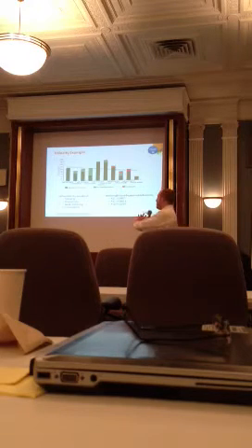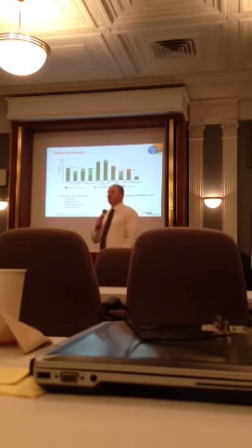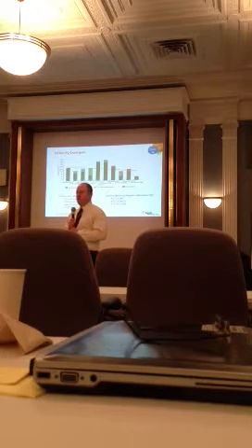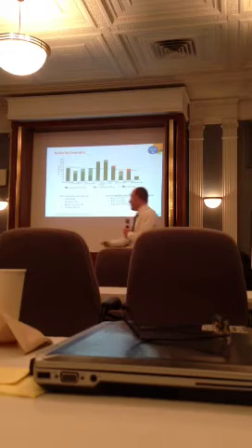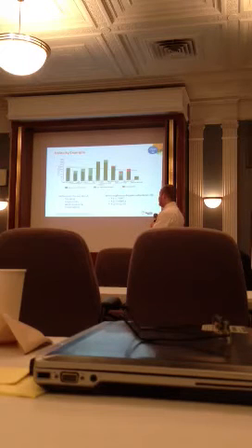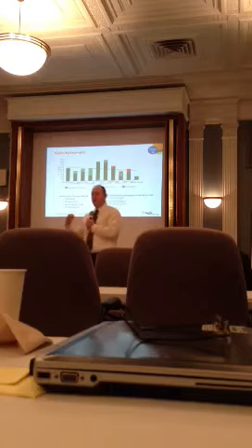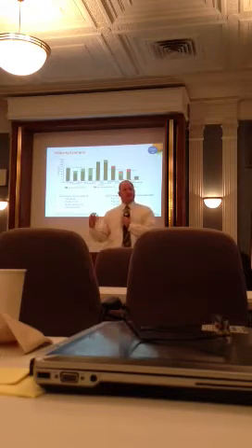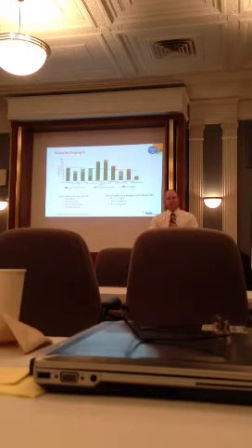So I will tell you that in my team, that product took the majority of the folks on my Scrum team. The other 2 products were smaller. Now, this iteration here has a lot of light green associated with it. Light green is not good, right? We committed to getting something done in that iteration, and we didn't. We didn't get it accepted until after that iteration was over. So on the surface, that looks bad.